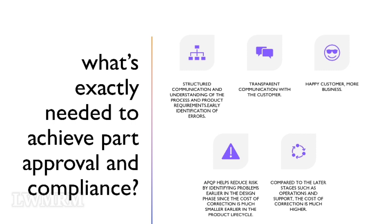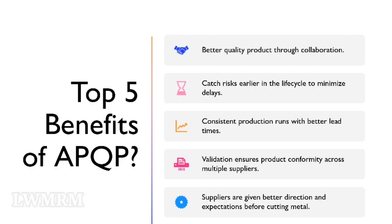APQP helps reduce risk by identifying problems earlier in the design phase, since the cost of correction is much smaller earlier in the product lifecycle. Compared to the later stages such as operations and support, the cost of correction is much higher. Top 5 benefits of APQP: better quality product through collaboration; catch risks earlier in the lifecycle to minimize delays; consistent production runs with better lead times; validation ensures product conformity across multiple suppliers; and suppliers are given better direction and expectations before cutting metal.